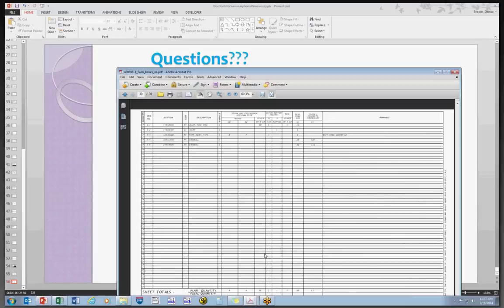All right. This was added in with this, where they've got the summary of drainage. There's only a few in here. This would be an example where you only have a few, and you could put these items in the summary of miscellaneous drainage, and therefore eliminate this huge sheet right here completely. But that's going to be project by project, and whoever the engineer is, their preferences on that.